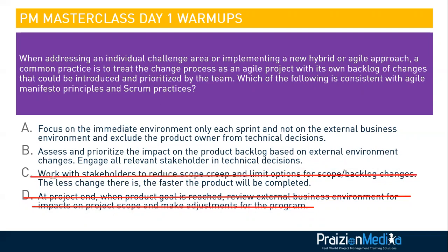In the world of Agile, we embrace and welcome change. The only thing we do not do is, within the sprint, encourage copious tons of change. We don't do that. Once our sprint is locked in the world of Scrum, we keep it as pure as possible. So that is a different kind of question, but it still comes into play.